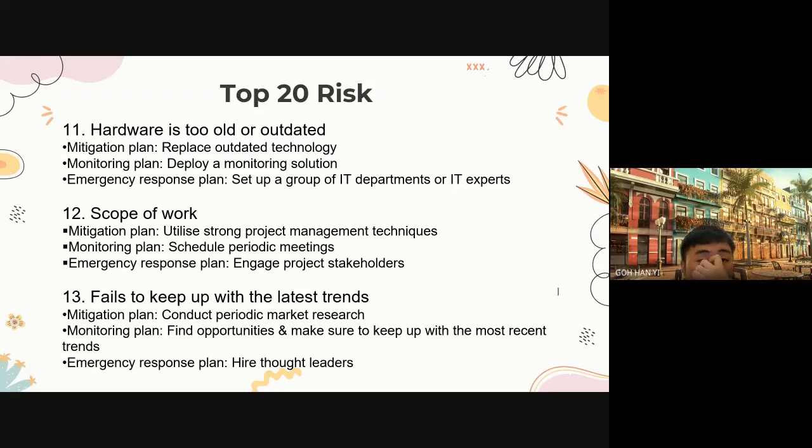First is that the work scope is not well defined, and the risk is in failing to notice critical information or in defining the scope of work incorrectly. The second is scope creep, which is the term for unforeseen adjustments and unchecked expansion of a project scope. Scope creep can result in project failure, increased expenditures, and failure to meet deadlines. And the third is unnecessary feature addition, which is regarded as a poor management practice and a source of increased risk in terms of expenditures, human resources, testing time, and so on.